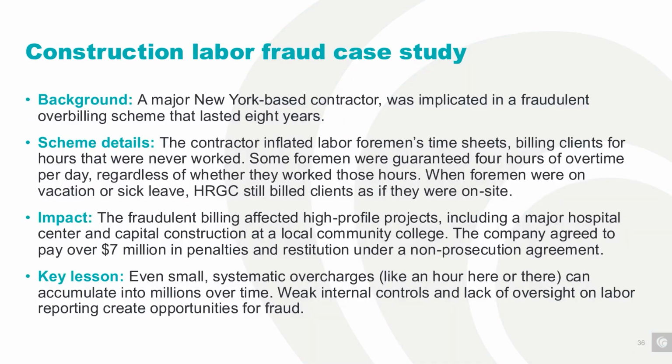And to best illustrate some of these, I'm going to go through just a couple of brief case studies. And the first one here involves a New York contractor that was implicated in a fraudulent overbilling scheme. And so they had actually gone and inflated their foreman's timesheets and were billing clients for hours that were never actually worked. And so some of the foremen were actually guaranteed 4 hours of overtime every day, regardless of whether or not they worked those hours.